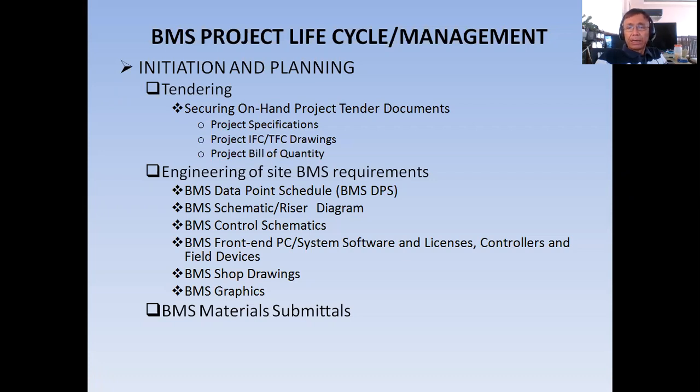Now, under tendering, of course, first you have to secure the on-hand project tender documents, okay? So what are these tender documents? Project specification, project IFC or TFC drawings, project bill of quantity or bill of material.